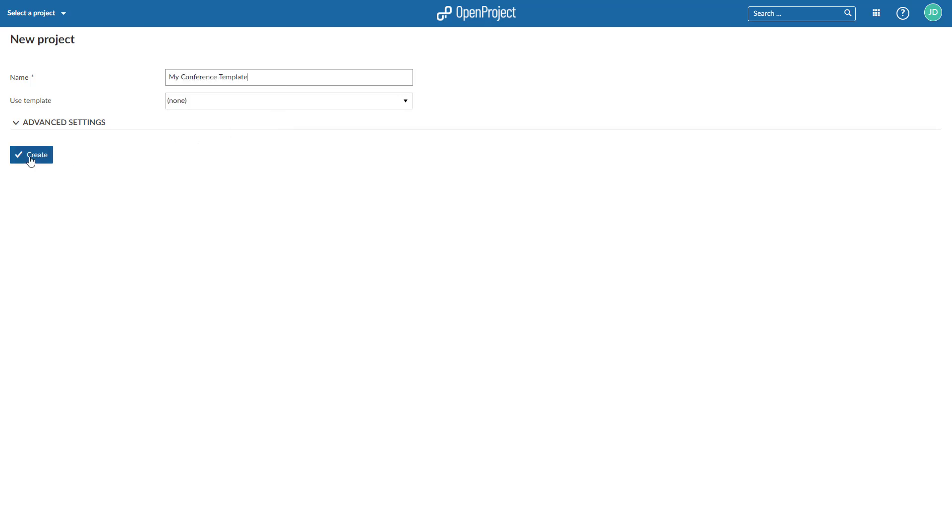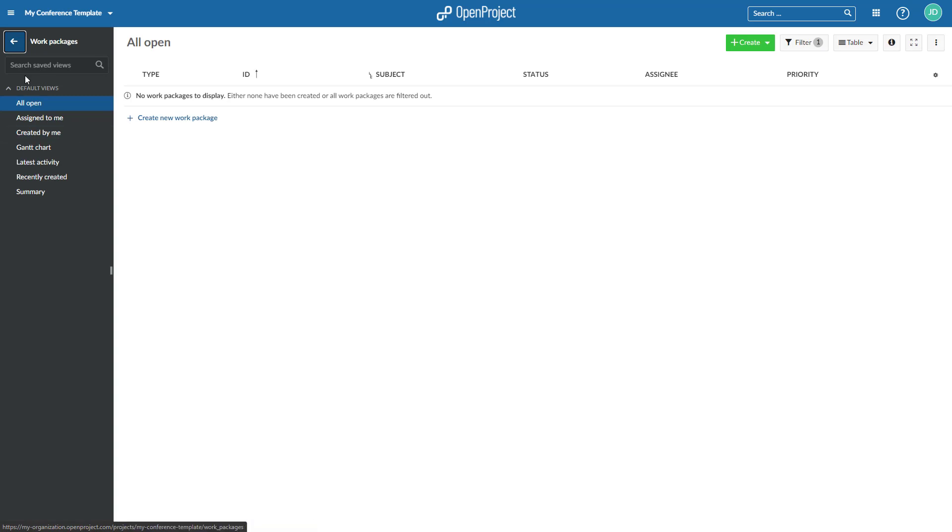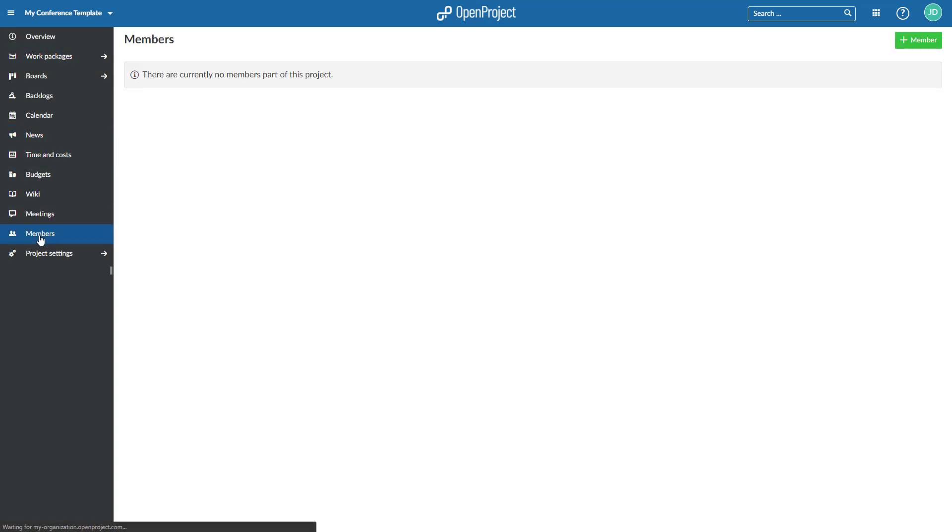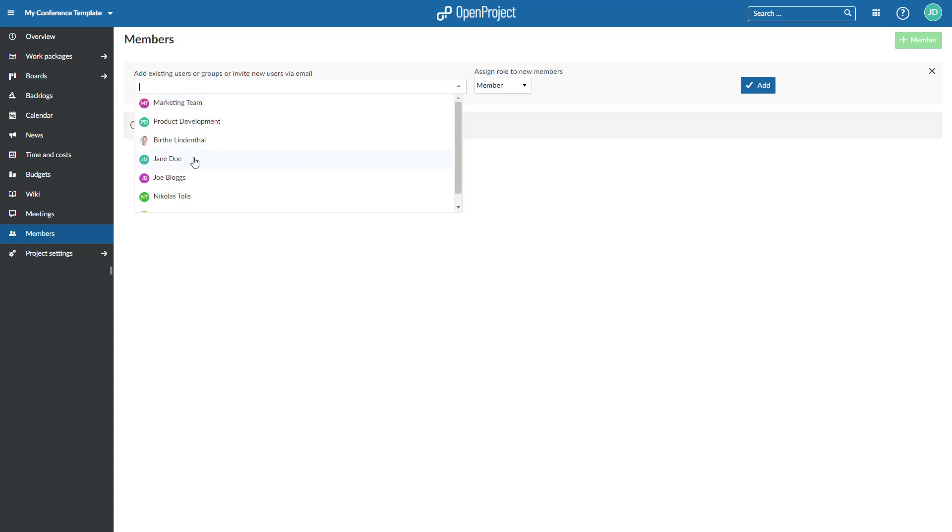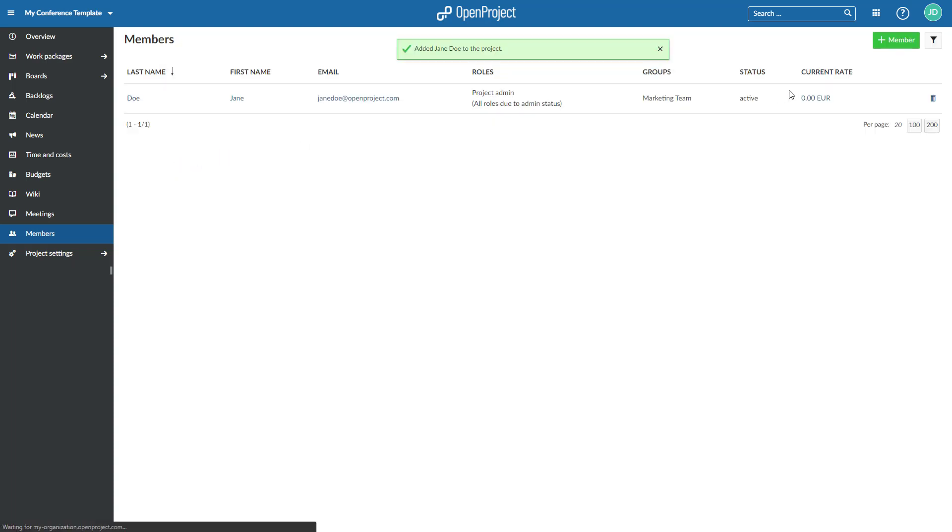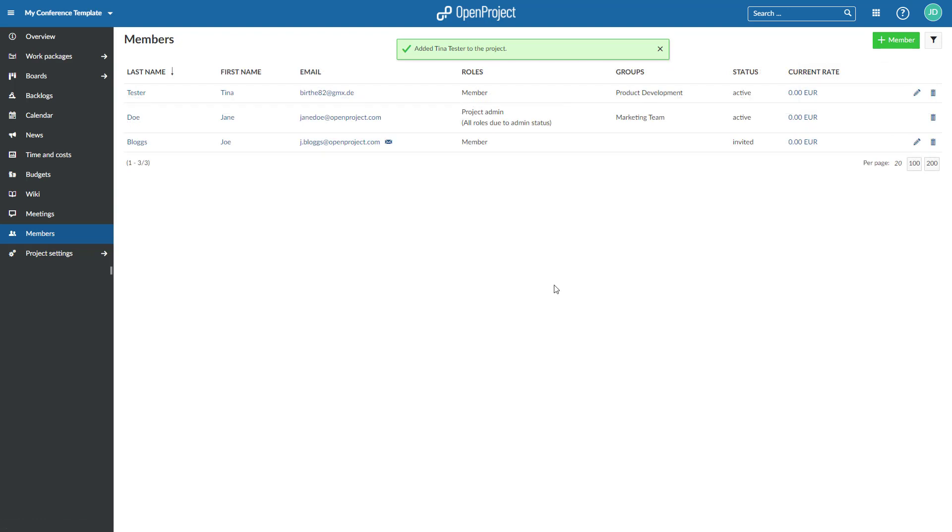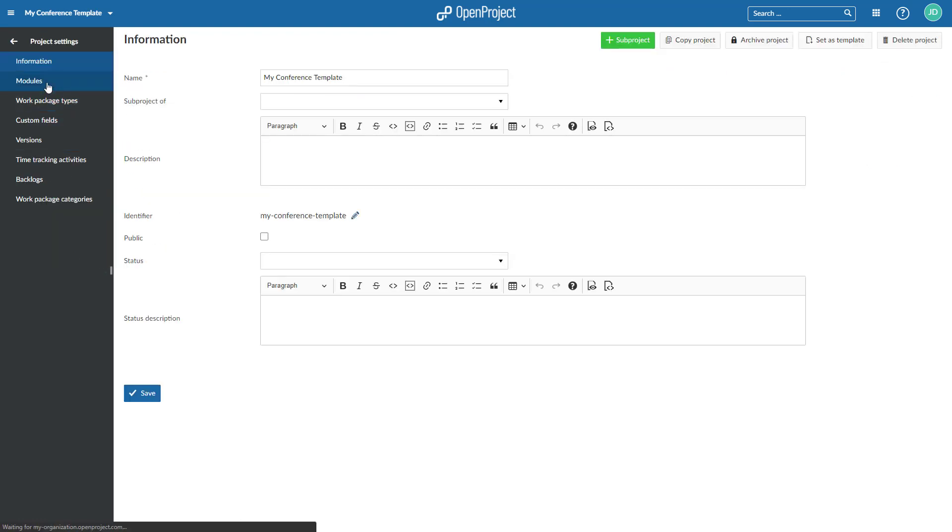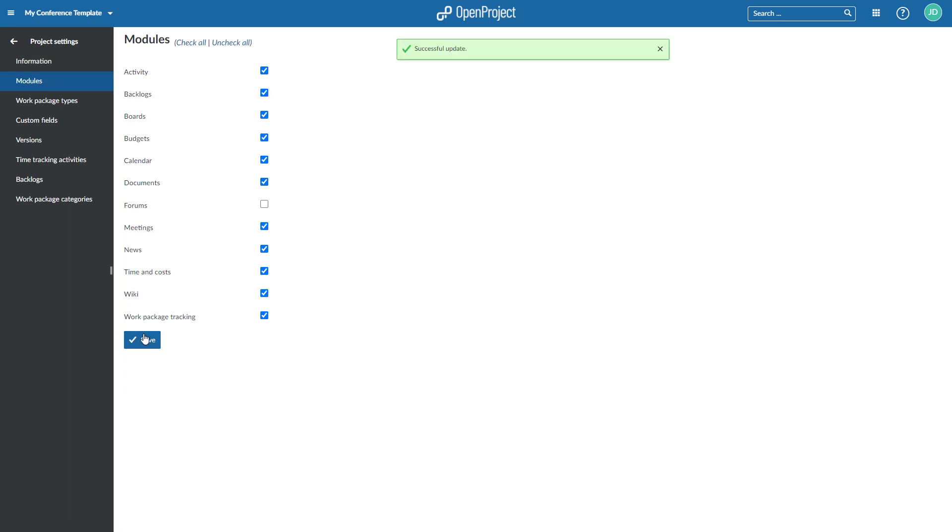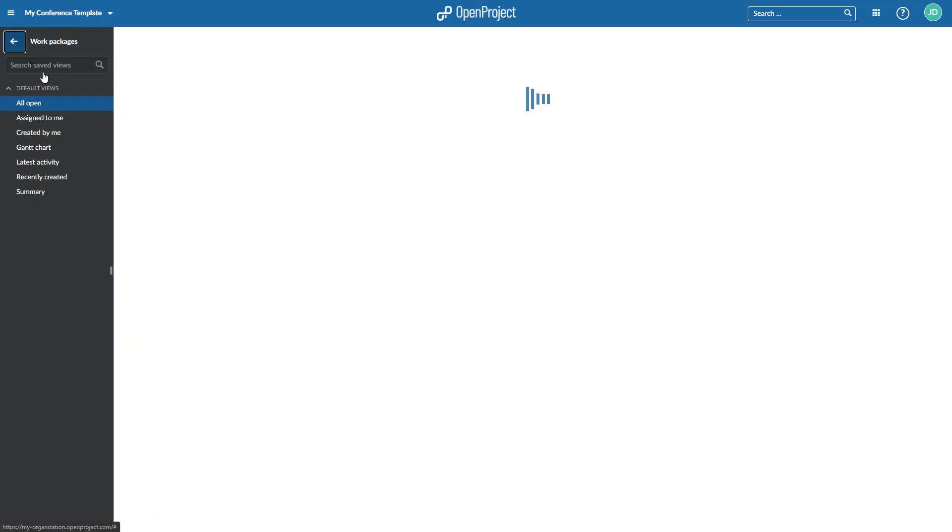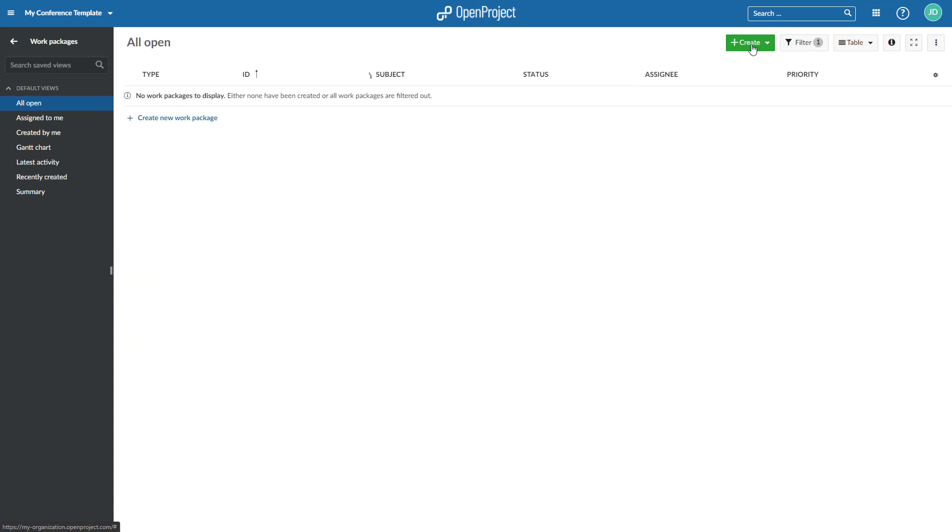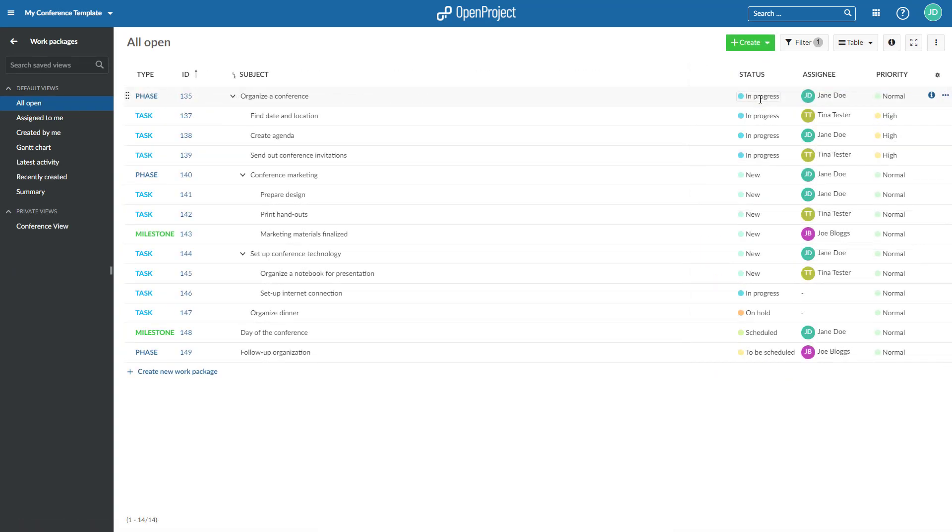Set up everything that you want to have available for future projects, such as adding project members, activating the modules, setting up a default work breakdown structure and creating a default project plan.